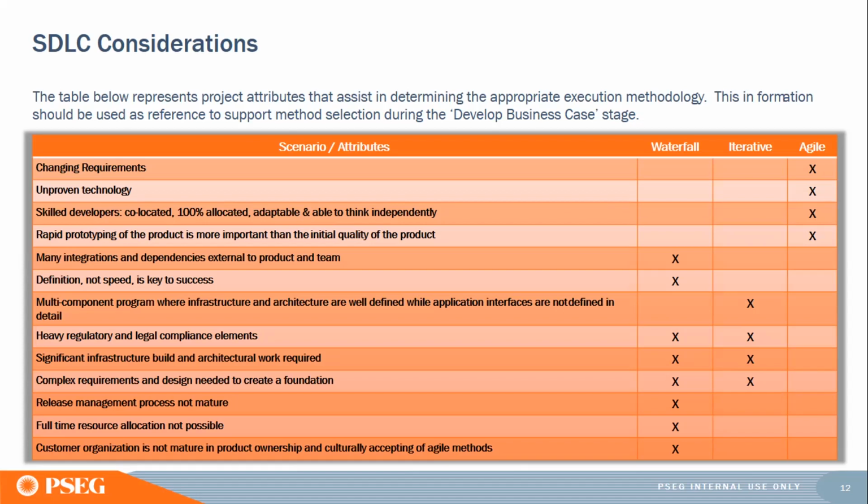Sometimes it may not be possible, like setting up a server pool or setting up a network for an office setup. It has to go in one big bang approach, right? It cannot be like, now I'll put up one corner and the other corner will come next week. But the approach is being decided by the team. We're not mandating it.